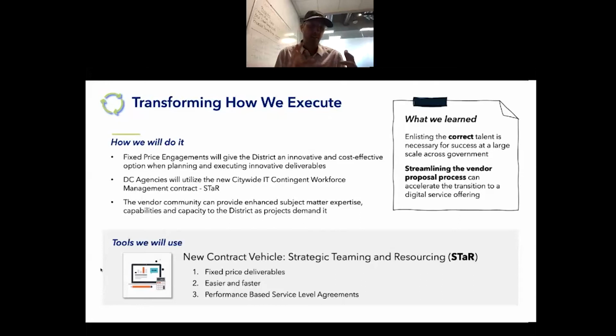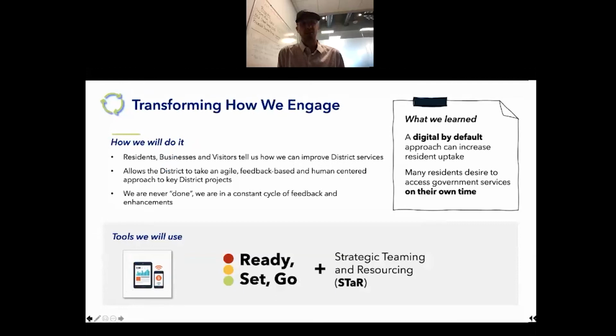But the last step is to take that data collection, the model, and then start to deconflict and go on the street and verify that all this data we've collected actually is true. We deconflict with utilities, and then we come up with our final plan, which hopefully has fewer issues and fewer concerns, so that we're not out on the street any longer than we need to be. We want to get in there, get out, and move on so the traffic can flow and people can get back to their lives. But these tools and the options that are available through many of the vendors, and I think a lot of people on this call, they're essential for us to make these decisions. We can't make decisions on an Excel sheet. We need these visualization tools, and plus we need these tools to show the director, the mayor, the residents how we're getting there. So we strengthen our decision-making process as well.